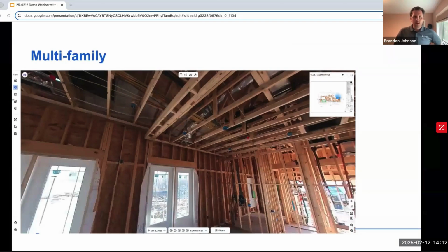Sweet. So I know you mentioned the example previously on going back and seeing what's in the walls for the multifamily. Do you have any other specific use cases that your teams have been able to realize for these projects? Some of the teams we've used it to supplement an RFI in Procore, being able to take that image from the capture and populate it in the RFI, and that way the architect or engineer can see what the issue is rather than just having the information in words.